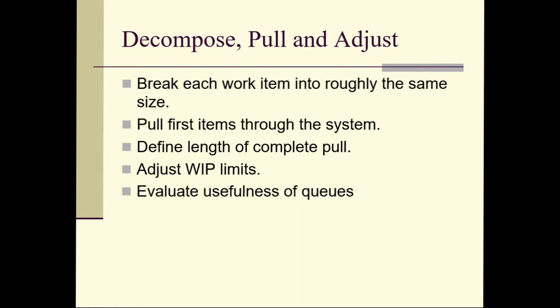In other words, don't force a bunch of stuff into your completed column. If you're the designer, don't design faster than the developers can keep up. So only try to time your design completion to match up with when the developer has finished their last piece of build and is ready for another piece of design. So you try and synchronize with the person downstream of you so things get pulled through the system.